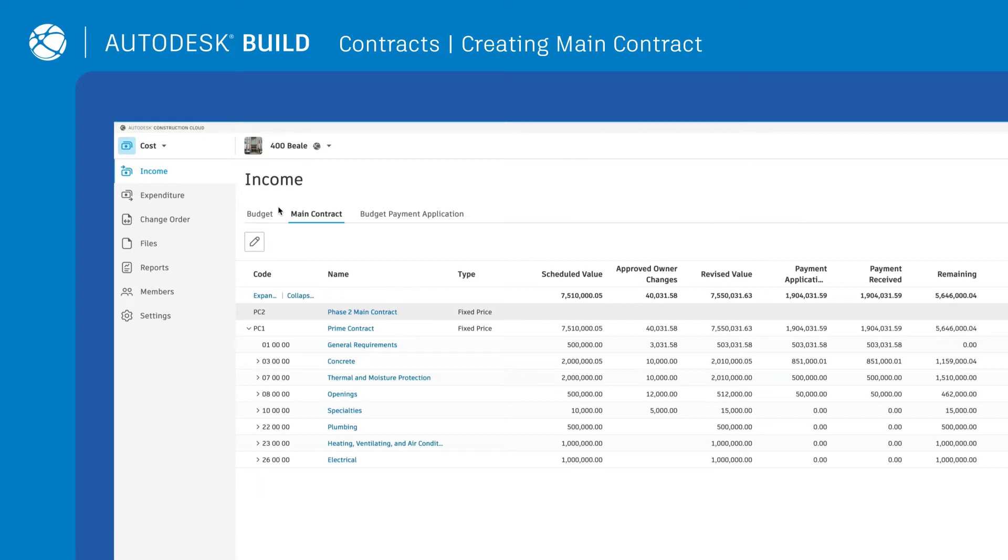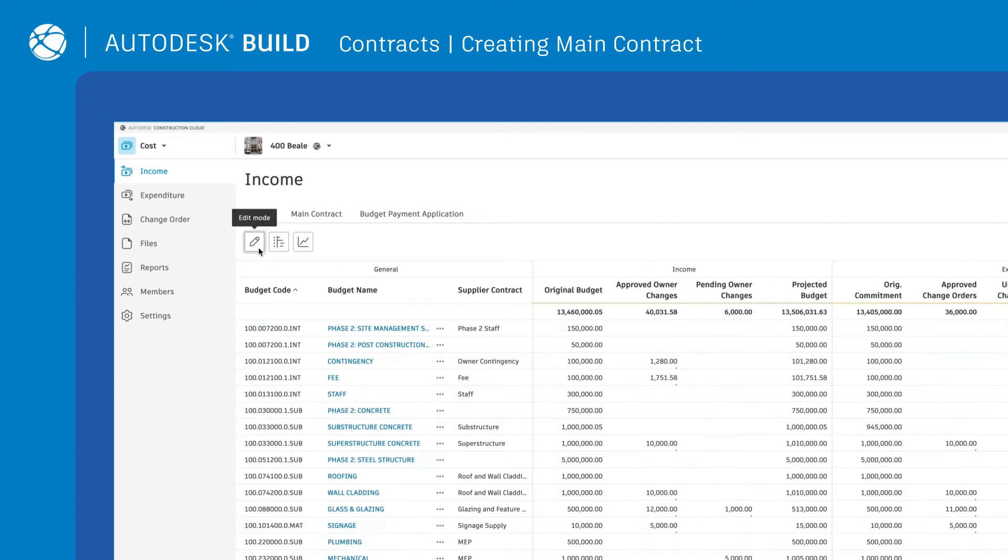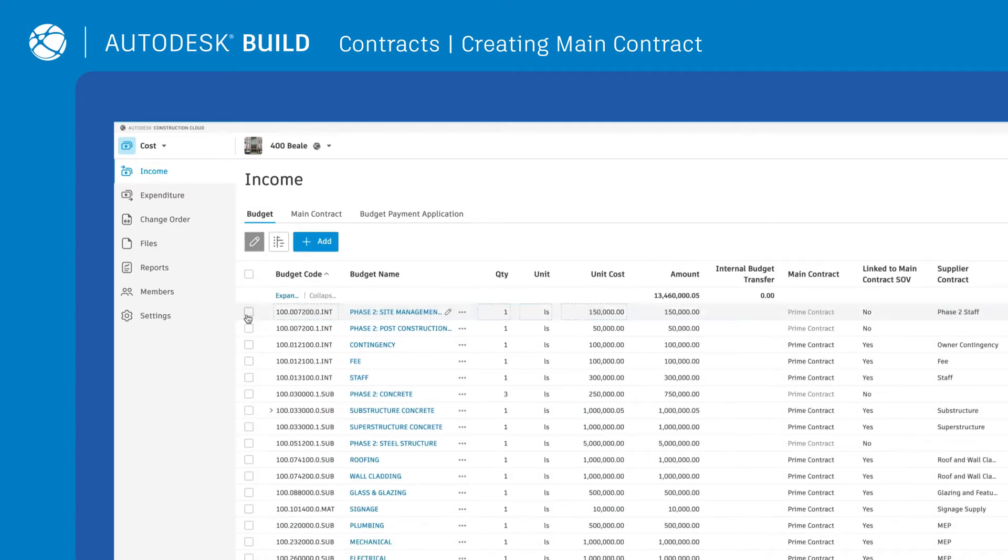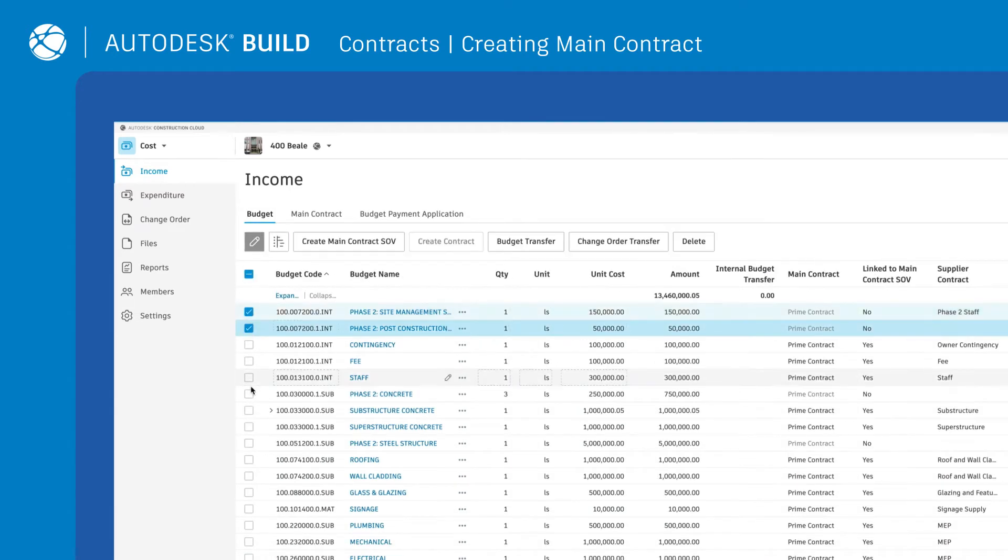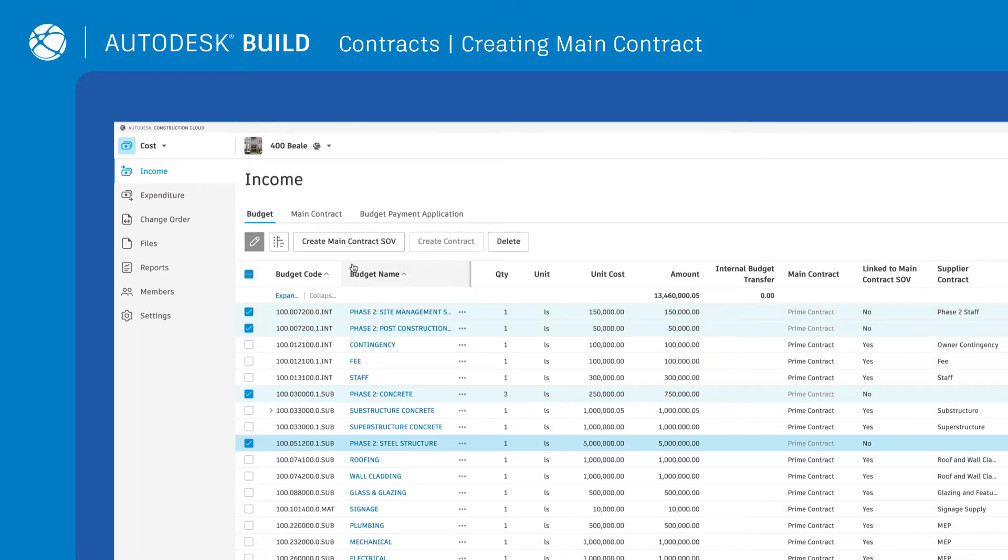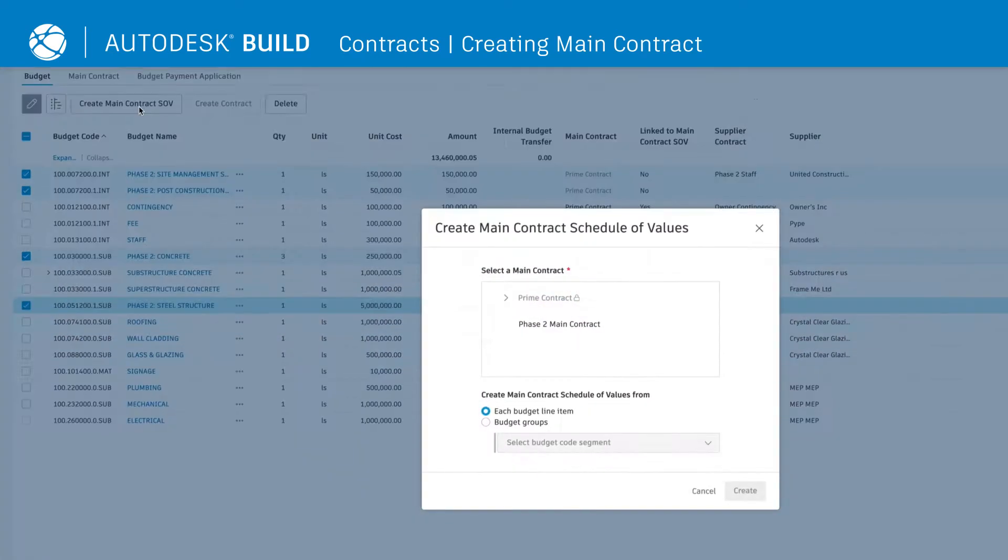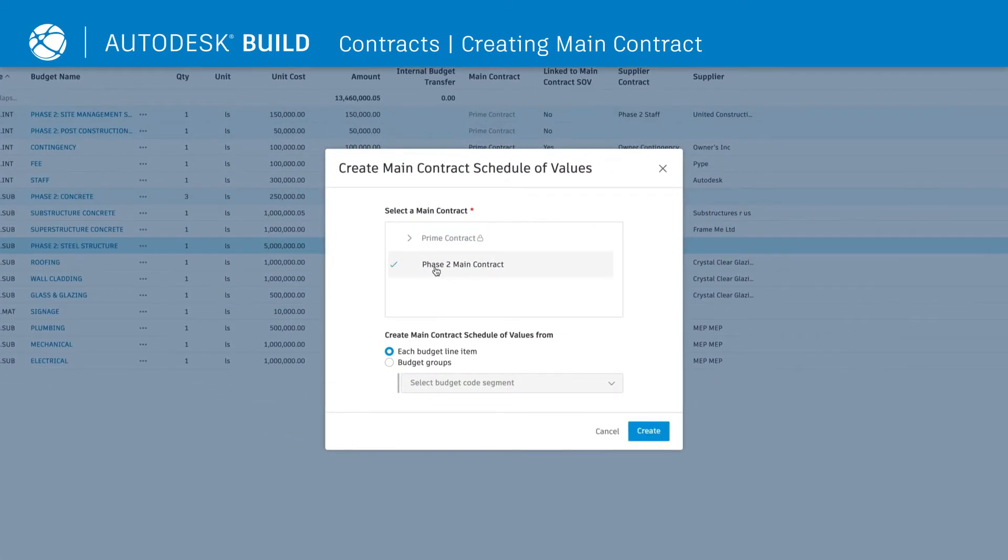Teams can then automatically generate the main contract schedule of values by going into the Budget tab. Click on the Edit icon, select the budget line items, and click Create Main Contract SOV.